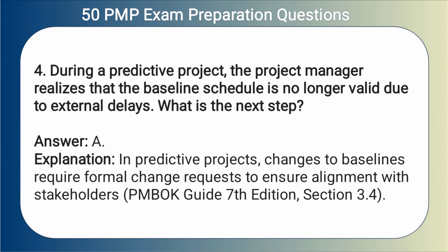Answer: A. Explanation: In predictive projects, changes to baselines require formal change requests to ensure alignment with stakeholders.